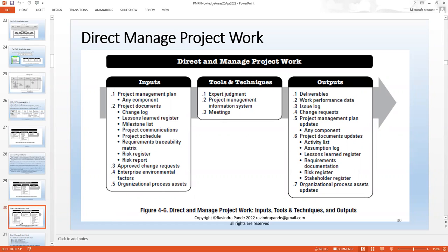To make sure, this task is assigned to a resource, and he might be given, let's say, 3 days. So let's say Keshav has from 24th April to 27th April to complete the task of integrating SAP leave data of an employee into our current system. Now there's a task and there could be subtasks as well.